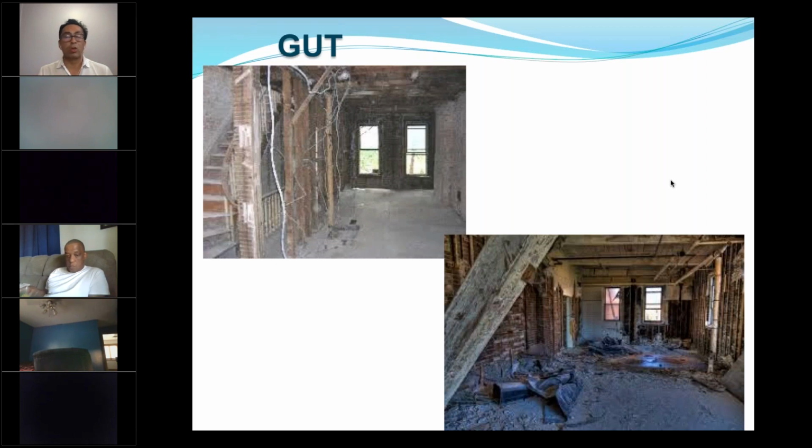Talking about the village, it is super important that when you're going to take on any type of project, it could be light, average, or heavy, that you pull permits. Okay, that is the first thing that you need to do once you close on the property. And we're going to be talking about the timeline of the rehab next, but I just want to stress this out. You always want to pull permits. You cannot take shortcuts. I'm going to tell you why.